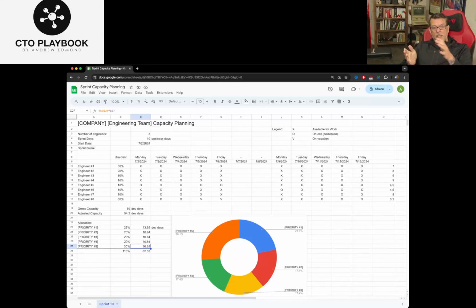It's great when you give it a try. You still don't want this to exceed 100%, right? You still want to say that 100% of our team has been allocated for. We've gone through the capacity exercise. We understand what the availability of each engineer was. We have well-groomed backlogs, and we'll get into backlog grooming and estimation in a later talk. But assuming that you have well-groomed backlogs that are well estimated, you can then just very simply in sprint planning, and we'll get into that again at a later talk, you can quickly grab the allocation as it is, which in this case is 13.5 dev days.